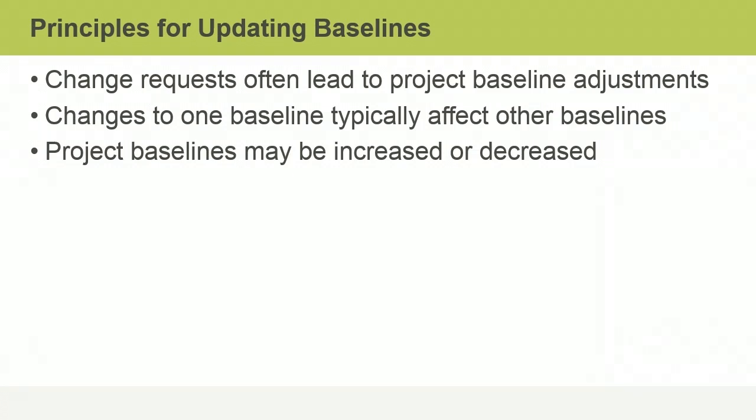Let's think about the scenario and how it illustrates some principles that apply to updating project baselines. Each time Margaret had to take corrective or preventative action, she made a change to one or possibly more baselines. The principle that changes to one baseline affect other baselines was demonstrated when the guidelines for using clinical studies weren't followed. Repairing this defect required updates to the schedule, the quality management plan, and the work instructions for the project.